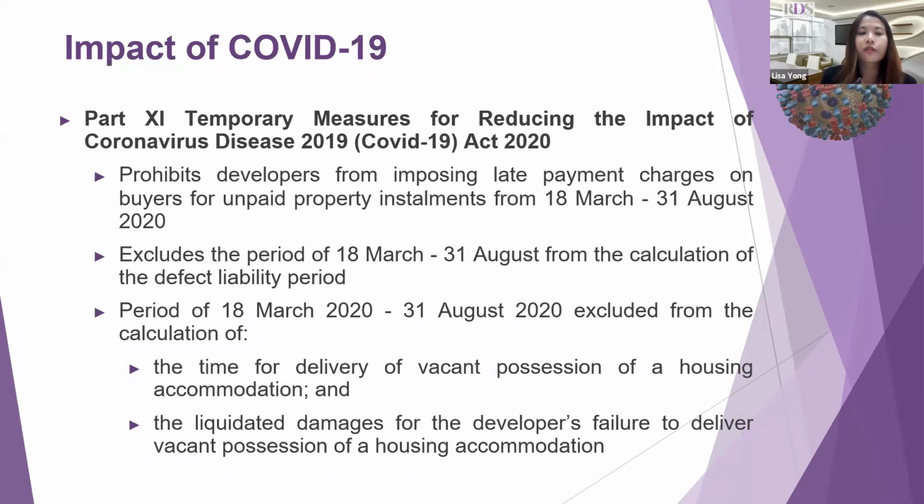the time for delivery of vacant possession of a housing accommodation and the computation of LAD for the developer's failure to deliver vacant possession of a housing accommodation will exclude the prescribed period. Housing developers may apply to the minister to extend the period up to 31st December 2020.